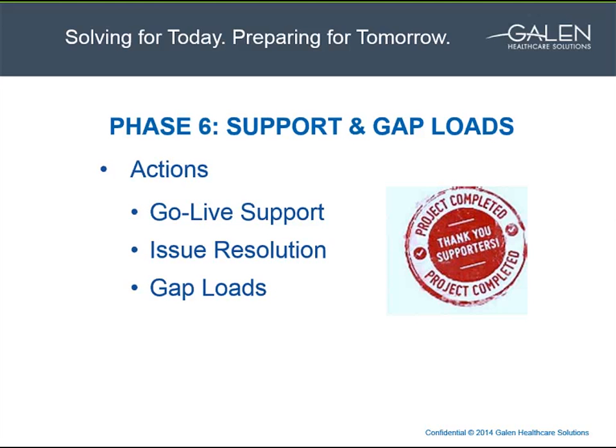Another client might decide to go into the conversion weekend with the data from the original extract, and then as part of the conversion, the Galen tech could identify the gap data that didn't convert and create differential mapping workbooks. And then at that point, no matter what the timing is, whether it's before, during, or after go-live, the process is the same: mapping any of those new data elements that were identified, and then a follow-up conversion to be done. So the gap analysis can be done post-go-live.